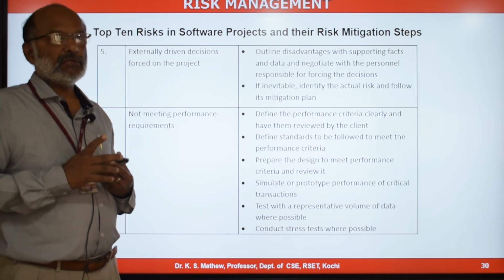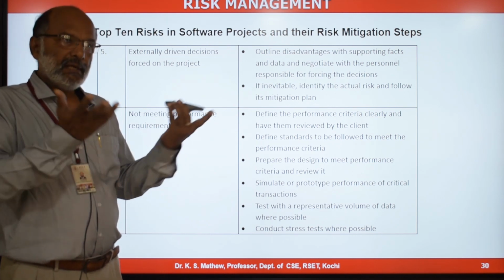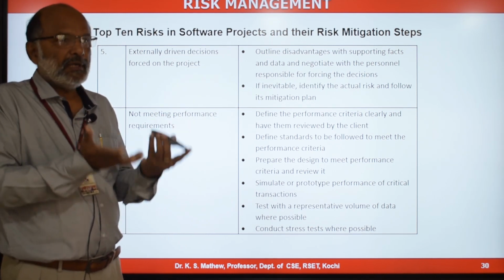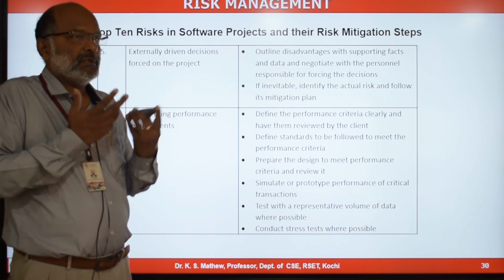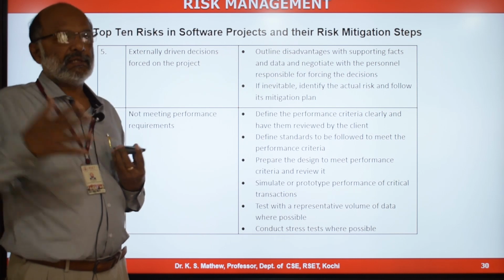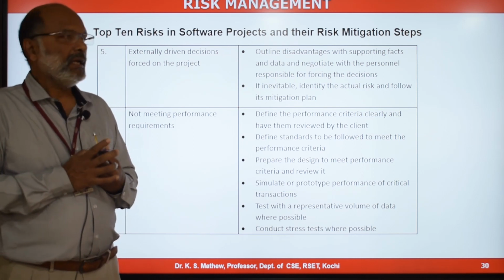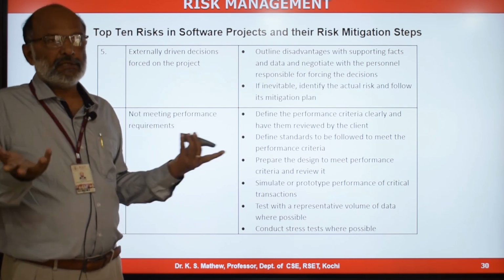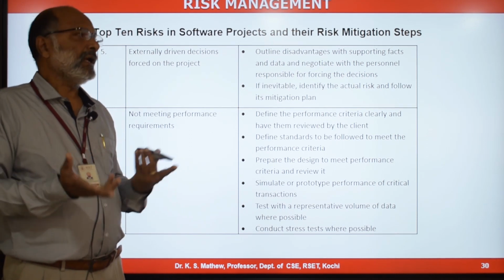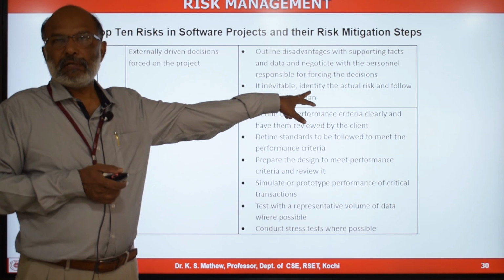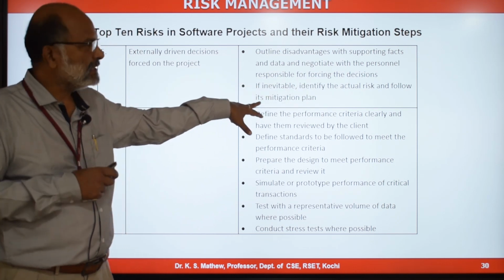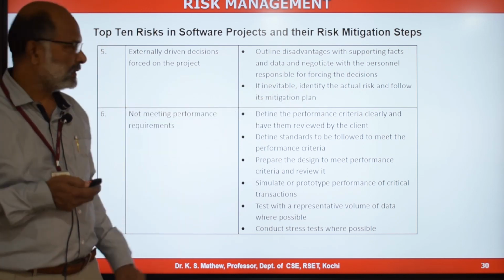So you need to go to the person who is forcing decisions and try to convince him with the proper information and data and tell him that if you are going to force this decision, these are the risks that are going to happen in the project. And even after doing that, if it is not possible to convince him and you need to accept that decision, then identify the actual risk that can happen because of that forced decision and manage the risk.